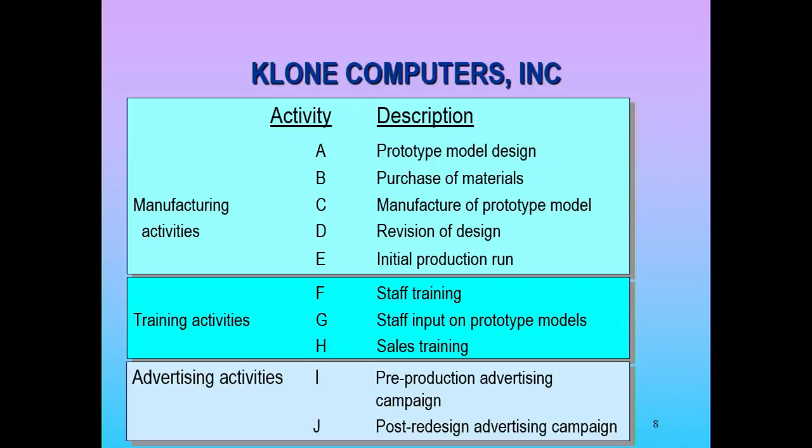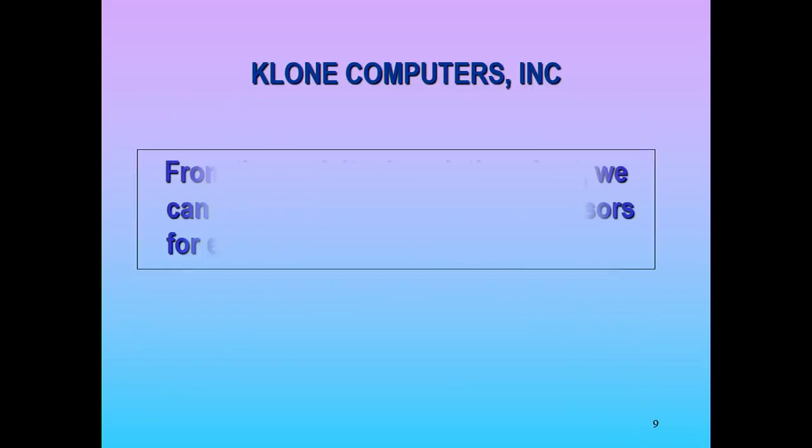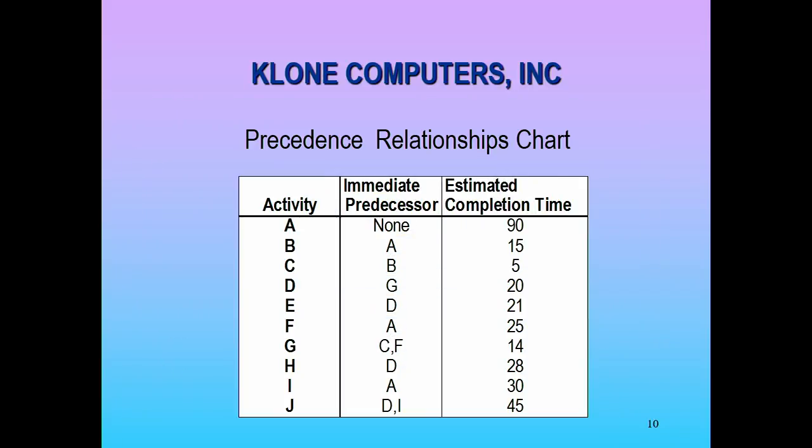Go ahead. Resources. So one of the things that resources come down to is time, right? Duration. So we're talking about project scheduling. Cost obviously is one thing, but right now we're just going to focus on the duration of activities. Does activity A take 5 days, 10 days, 20 days, 50 days, 100 days, whatever it might be? Does activity C take 1 day, 3 days, 9 days? It doesn't matter. So let's focus on duration. So we go down those activities and we assign durations to all of them.